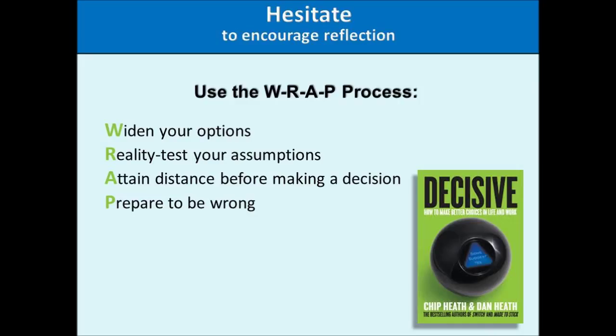Setting checkpoints to remind us to assess project progress to date is a useful way to help us see if things are working or not. A checkpoint could be when the project has spent a certain amount of money, for example $50,000, on a certain activity, or 6 months from now when a progress review is taking place. These checkpoints trigger an assessment when the decision to carry on, quit or modify an activity will be taken.